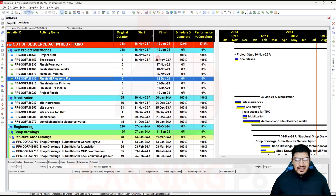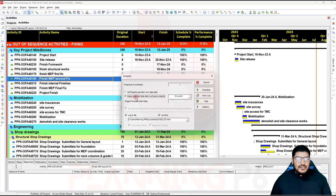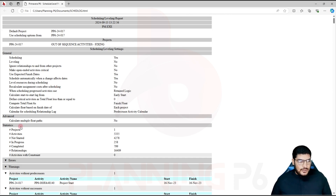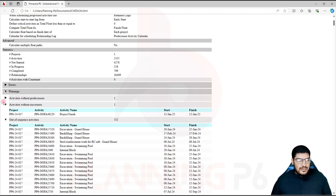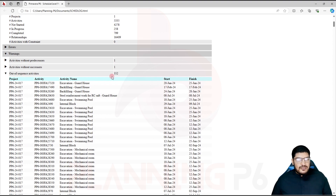The schedule has not had a baseline assigned — you can do that. First we will run our schedule. You can see here: apply selected data date, open it, set whatever your data date is, schedule once. Then go to the schedule again or press F9 and view the log. In the log you can see errors and warnings. If you close the warnings — for example, activities without successor — and look at out-of-sequence activities, there are 352 activities.